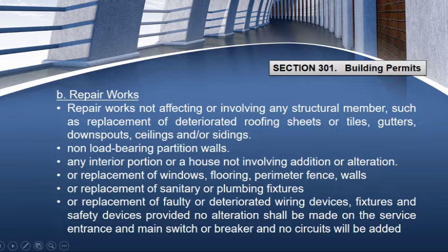So, ang mga nabanggit ko na repair works ay hindi apektado ang mga structural member ng project or ng bahay or ng isang structure. Another could be non-load bearing partition walls. So this is any wall that divides a space but does not carry any vertical load from above. And this could be considered as repair works and exempted from building permit.